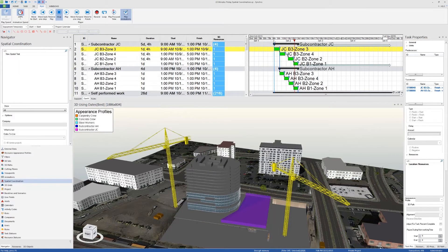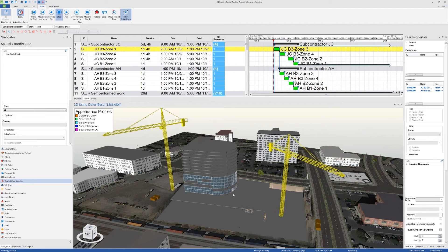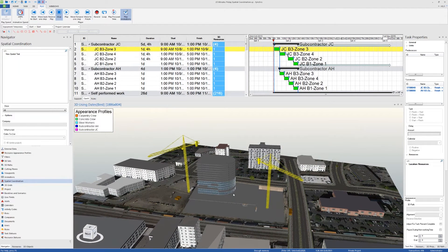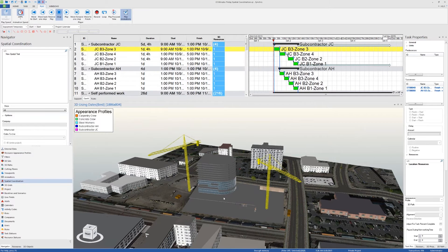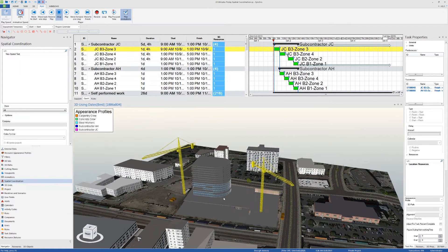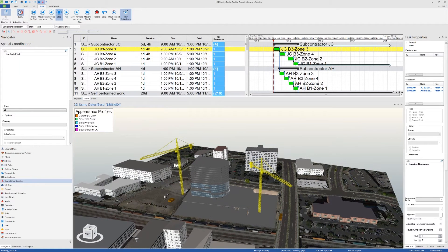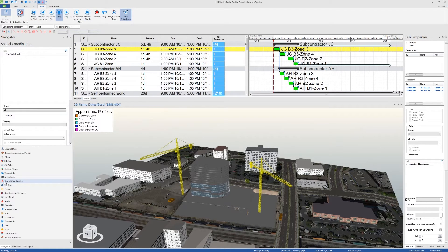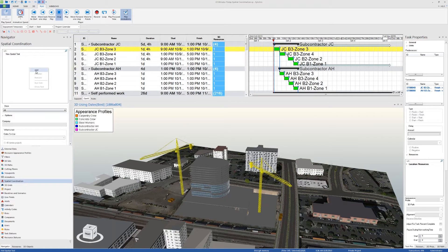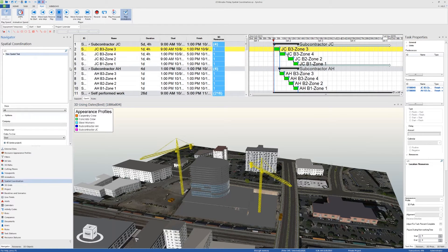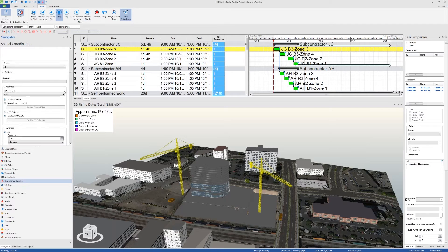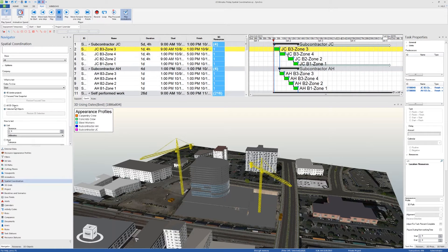I already saw some clashes from running the animation, but I'm going to run a spatial coordination test to make sure these clashes are there. The way to do that is you go to spatial coordination in the navigator tab, right click, add a new spatial test. I already have one right here. What I did here is that I clicked on selected 3D objects so the clash detection will run only on the selected 3D objects.